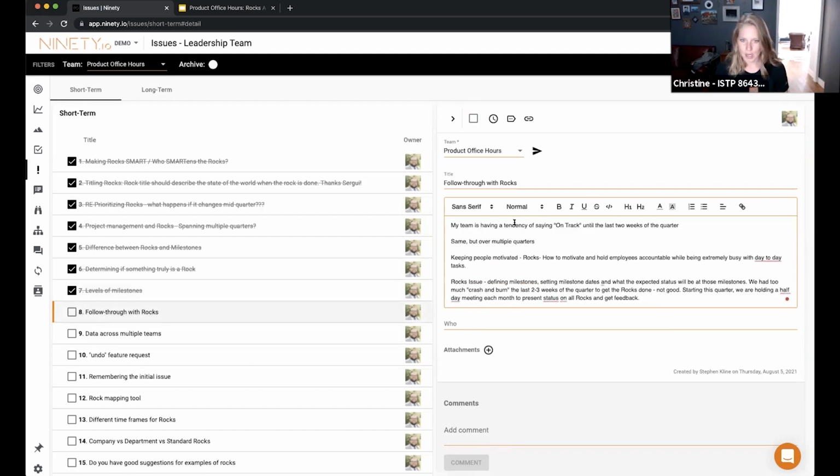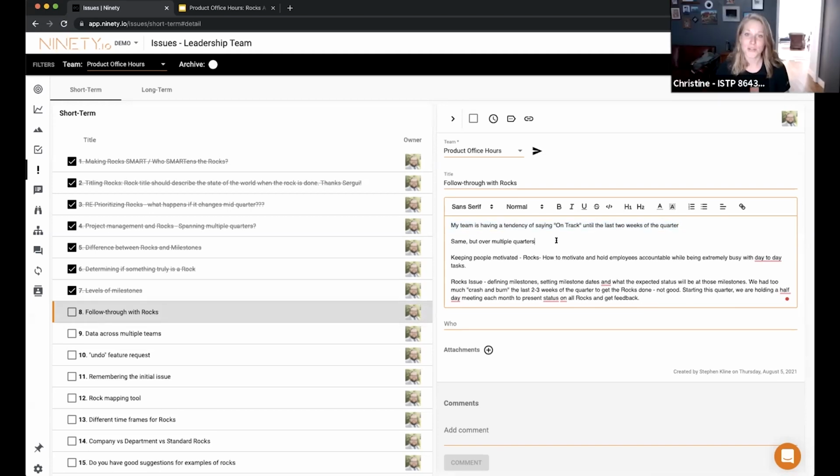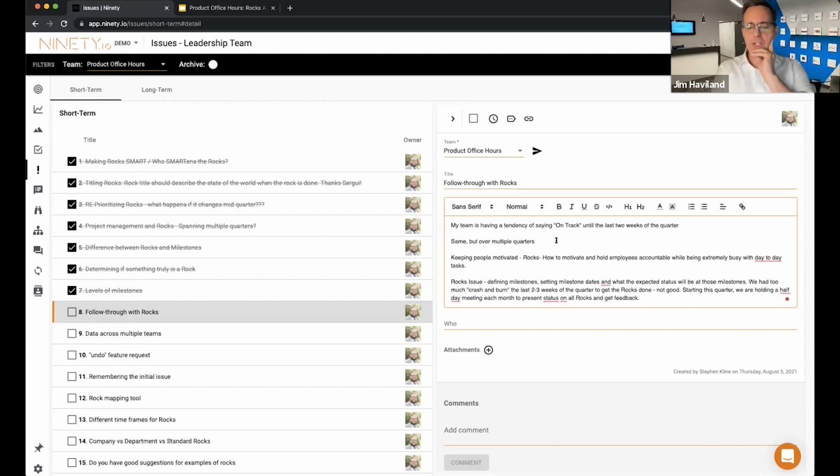Follow through with rocks. Yes. So we've got the optimistic team that likes to say that they're on track until the last 2 weeks of the quarter. Yeah, you gotta break them. Yes. So milestones help with that, because then you can call out earlier.